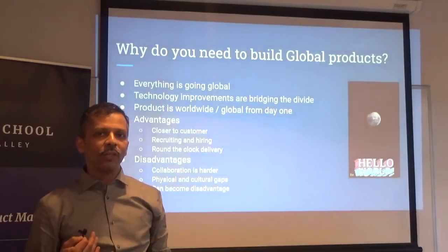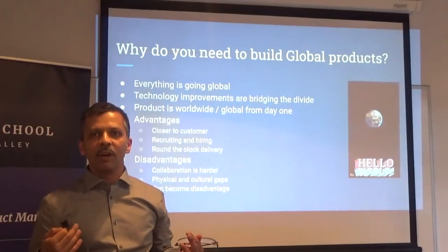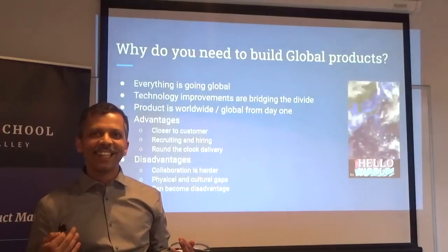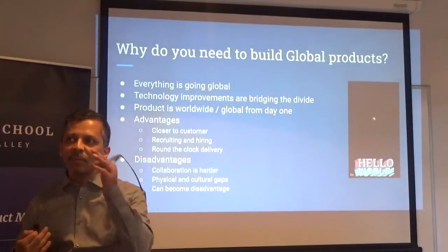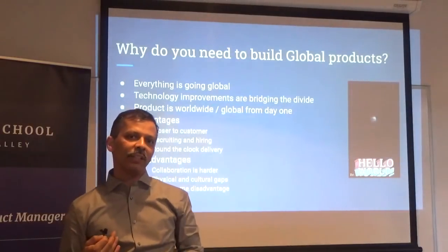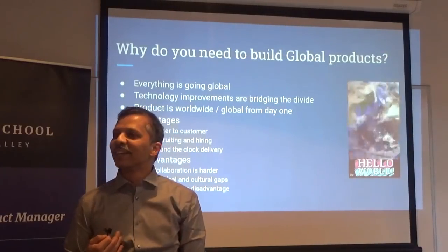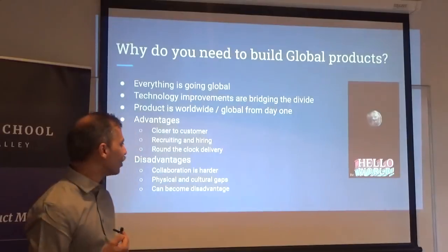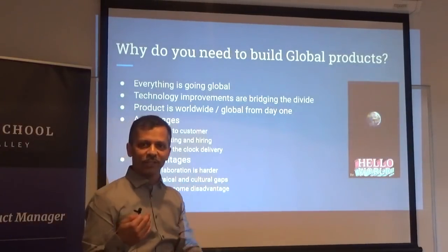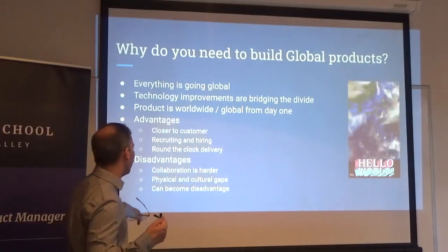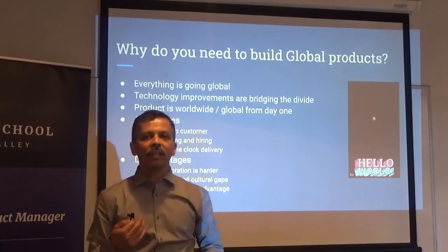Especially one of the interesting things that I found is that you need to know the calendars and holidays in multiple countries. You can't plan a date and say, I'm going to deliver on that date, and then find out that there were general elections going on in India. So we had to move the date in the last minute because we didn't. And by the way, general elections in India go for, I think, 2 months or something like that, because it's such a big country and a big democracy. So it sometimes can be a disadvantage if you don't plan for it.